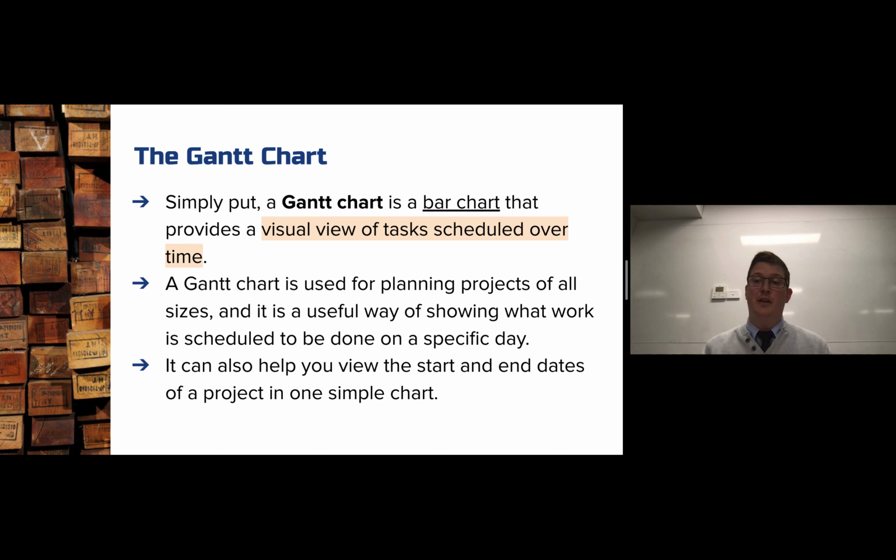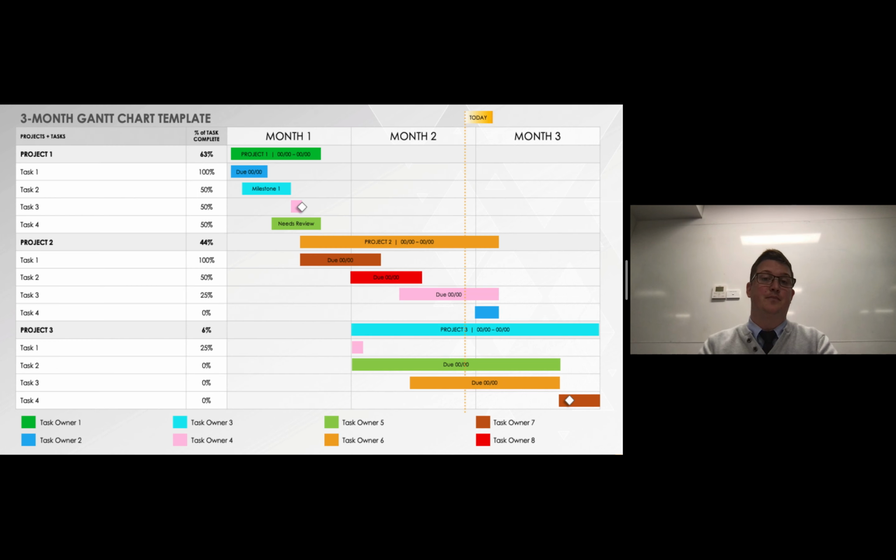The benefit of the Gantt chart is being visual, really easy to read, and secondly, it helps you really easily work out the start and the finish date of each part. And it can then help you see how each process in the design process or the construction process is actually linked together. For example, I need to get this part of the project done before I can start this. Okay? And that's represented by 2 bars being separate from each other. But when they overlap, that means they can actually happen at the same time. Okay? So it's a visual representation to help you understand those things.